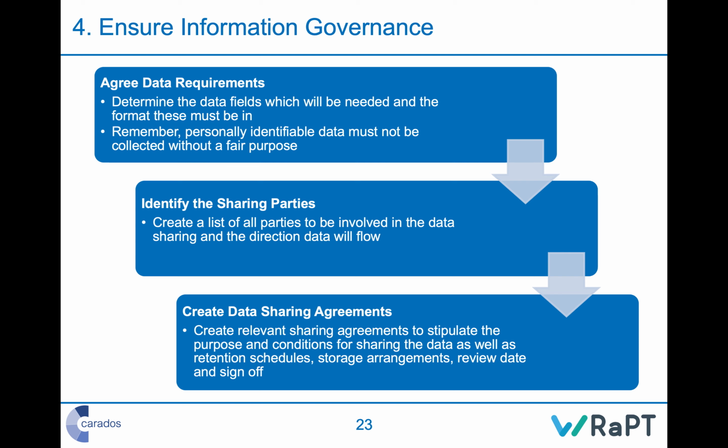Information governance is a topic of complexity. Key takeaway is engage an expert in information governance within your project team who can engage the others in getting this done, because information governance can hold a project up for a year if you're not doing it right. So make sure you are getting help early on.